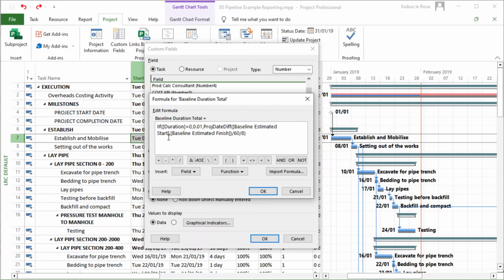And this first section is simply to ask whether the duration is 0, to account for the milestone dates that we might have. So although they don't really carry any value in terms of the final completion, I've assigned a small value so that we don't have a divide by 0, and otherwise we're going to get errors on each and every one. So it's a very small percentage or weight that I add to it. I think it's actually a good thing because as we hit milestones, that also contributes towards completion. So it's actually not inaccurate, but it's just to account for that.